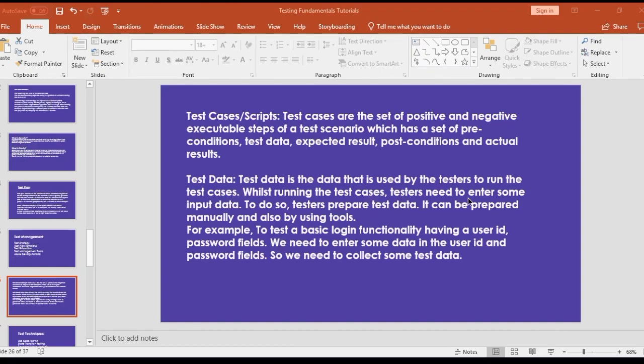To be a 2 weeks interval. What about stand-up meetings? We have stand-up meetings, and stand-up meetings are usually every day, 15 minutes. Within your sprints, you have functional areas that you are testing within your sprint period. The stand-up is just a daily scrum.